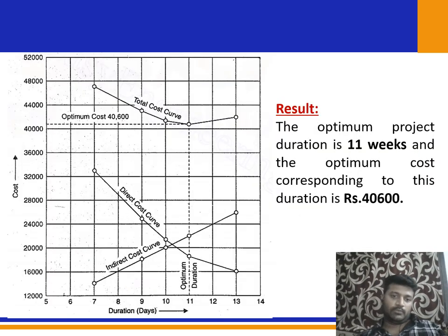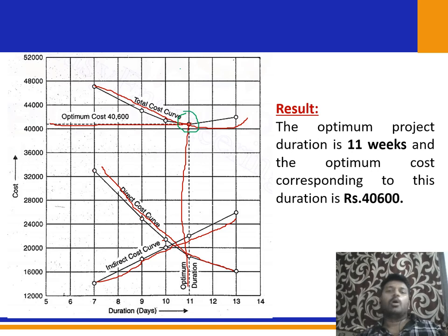And before that, we need to draw the network cost duration curve. Okay, so I will take the x-axis as duration and y-axis as cost. So I am plotting the direct cost. Let us plot like this, and indirect cost like this. Sorry, indirect cost like this line. So when I combine both the things, okay, you will have a total cost curve like this, and the point at which it reaches the minimum value, that is this point, this is called as optimum cost.